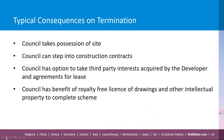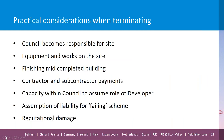The typical consequences of termination in the development agreement: the council can take possession of the site; the council can often step into the construction contracts and architect's appointments; the council will often have an option to acquire third party interests the developer has acquired within the site and pick up agreements for lease with pre-lets; and the council will usually have the benefit of a royalty-free licence for the use of drawings and intellectual property to complete the scheme if it steps in.